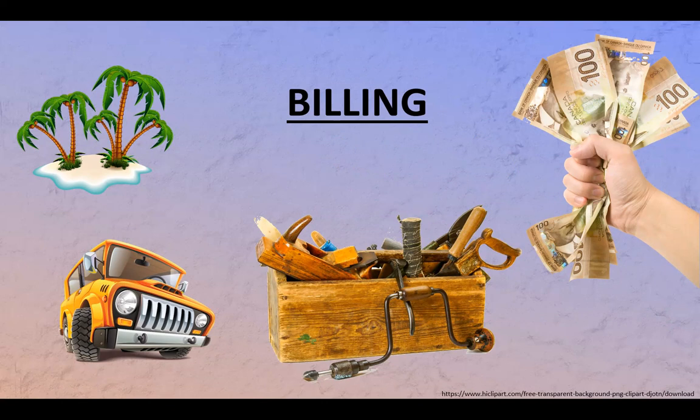So, for example, let's say you have a job that will require $200,000 of equipment purchased, okay? And you don't have $200,000 in your bank available. You don't have cash. Can you still do the job? Yes. And I believe I told you that in previous classes. If you get a line of credit, or if you have a good credit relationship, or sometimes a good relationship with the distributors, they will have a limit, maybe $50,000, maybe $100,000, maybe 200, depending on the size of your company and whatnot.